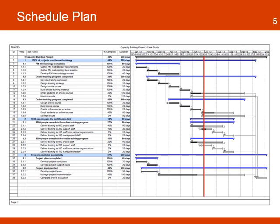During the implementation phase, the project team will update the progress made on each activity, and the tool will diagram the progress on the horizontal bars. For example, the chart shows a red line to indicate the current time of the analysis. To the left of the line, the activities that are not fully marked in black are activities with delays. That means that it will take more time for those activities to show as completed.